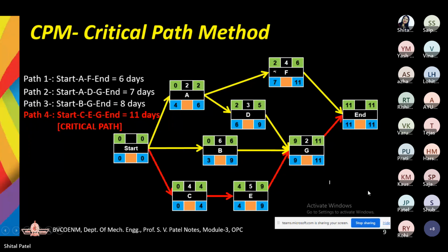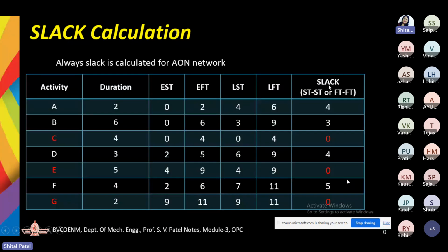Okay. So here the slack is basically calculated for all the activities, so that if some of the resources are going to be shared with the other site, right? If the same company is having 2, 3 sites, we cannot buy a huge crane for every site. That crane itself costs lakhs of rupees, right?